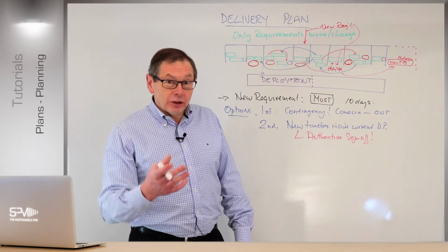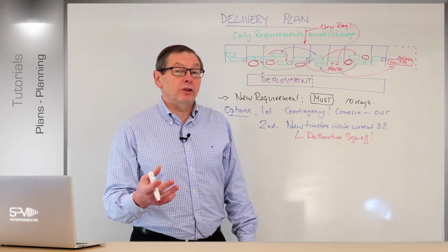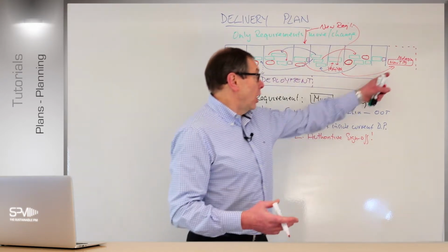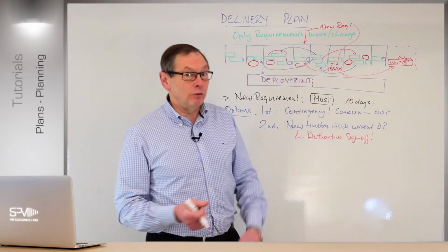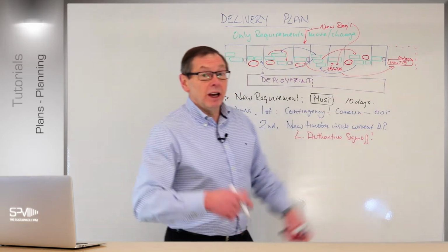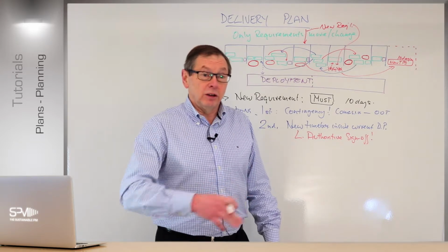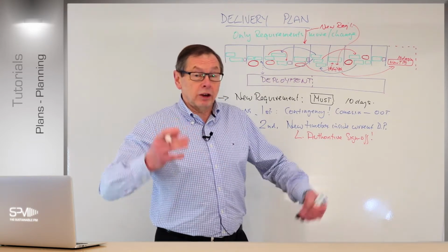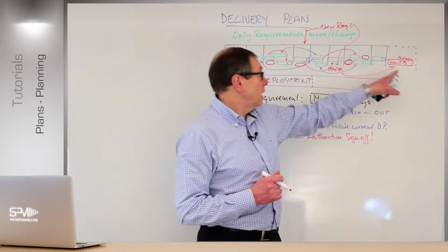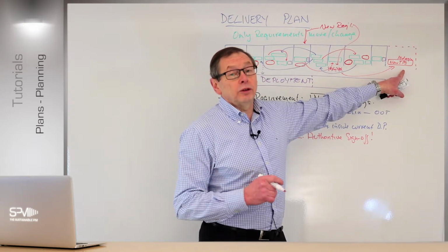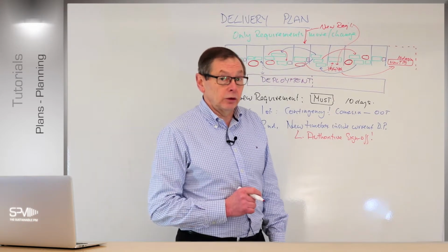So, in a sense, the original project is still going to deliver in the time we've asked it to. This is now an added requirement, and if the business are okay that we do that right at the end, we have sort of 2 end dates. Nothing wrong with doing that either. So long as they authorize that change and are happy with that situation and sign it off, then that's what you need to do. The original end date is still preserved, and I have another end date now, and it's signed off, so now I've got extra time but an impact on the delivery plan. So you just re-baseline the delivery plan, of course, right?